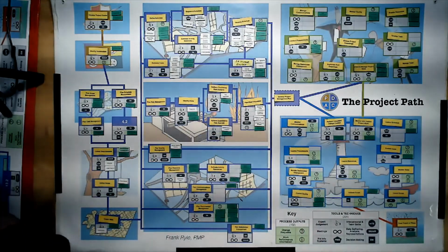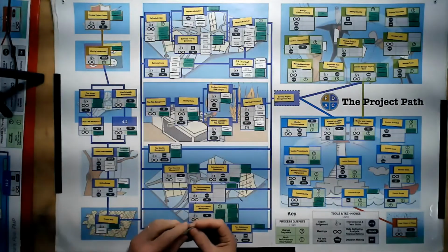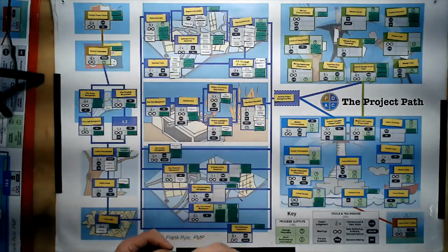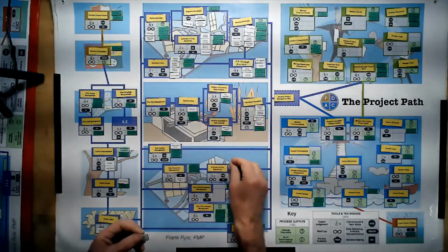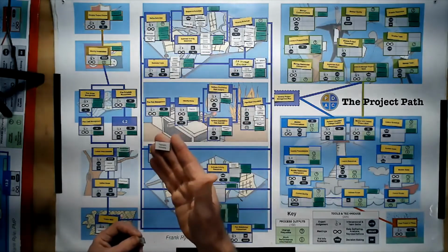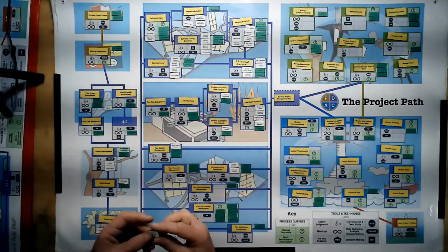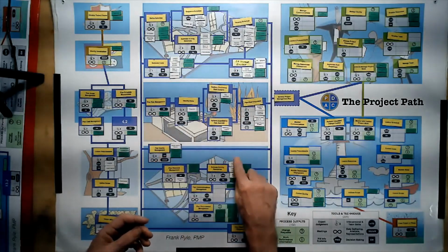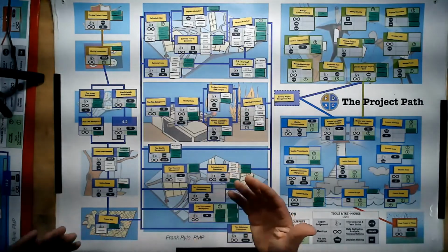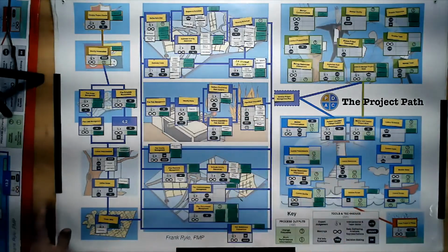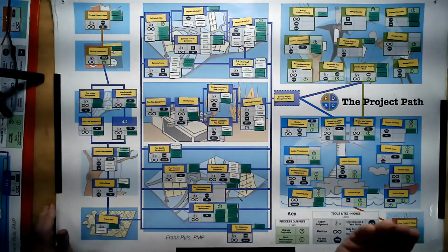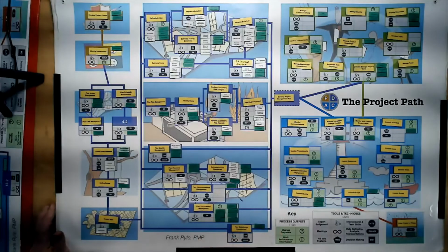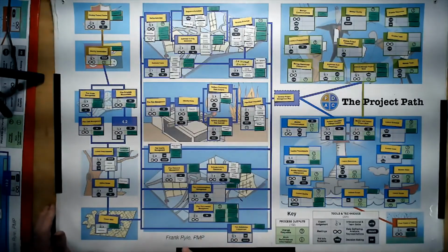And then I want you to see this idea of estimating being similar to estimating durations and similar to estimating costs, but with one difference. Here we see the analogous, yes. Here we see the parametric, yes. Here we see the bottom up, yes. But what we don't see is the 3-point estimating, okay? So we don't see that here. And I presume the logic is that if you're looking for a conference room or a helicopter or a crane, you don't want optimistic or pessimistic because it's a crane. You need a 200-ton crane. And so that's not what we're actually estimating in this case. So perhaps that's why they took it out.